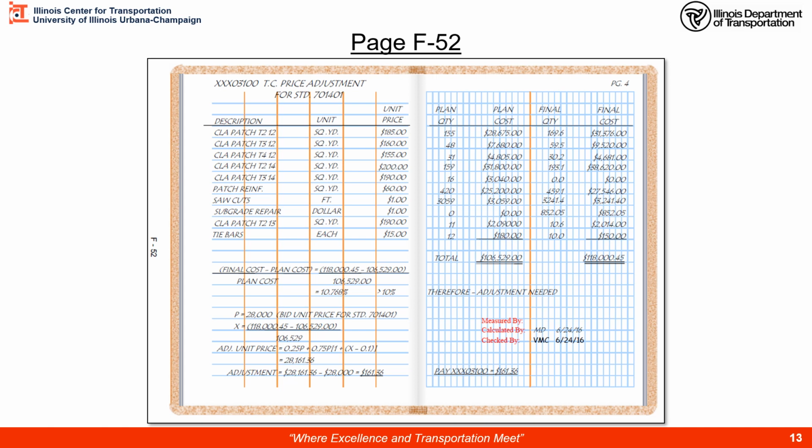And we will have to do an adjustment by adding in a new pay item, a XXX number, for adjusting the traffic control protection at a positive 161.36. If this work resulted in a smaller number, we would actually have a negative number and have to claw back a part of this value.